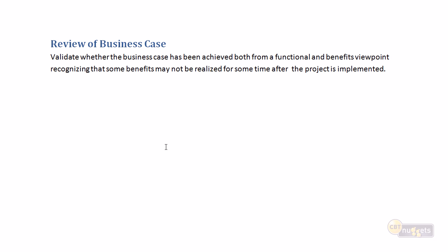Review of the business case. Here we're going through and we're validating whether or not we've achieved the results that the business wanted. Now, the business case, if you remember back to our last nugget, provides the overall objectives for the project. So we're going to review and determine whether, from the functional viewpoint, the project has achieved what the business wanted it to do.